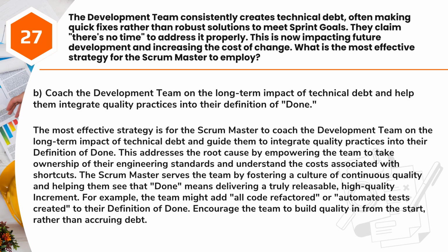Answer: B. Coach the development team on the long-term impact of technical debt and help them integrate quality practices into their definition of done. The most effective strategy is for the Scrum Master to coach the development team on the long-term impact of technical debt and guide them to integrate quality practices into their definition of done. This addresses the root cause by empowering the team to take ownership of their engineering standards and understand the costs